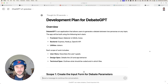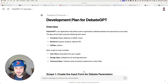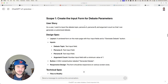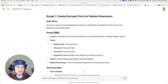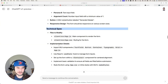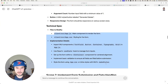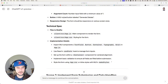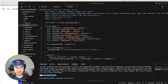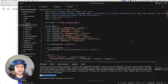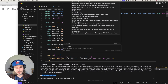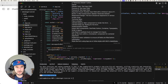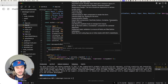The way I built this app is by generating a development plan using GPT-o1 preview — it thought for 25 seconds to generate the plan. The development plan produced individual scopes of work, each containing user stories, design specs, and technical specs with fairly detailed instructions on what needs to be developed. I then took those specs and pasted them into Cursor's composer feature.